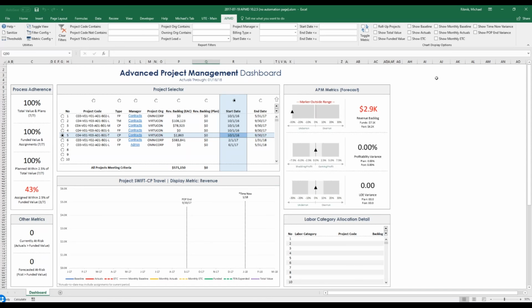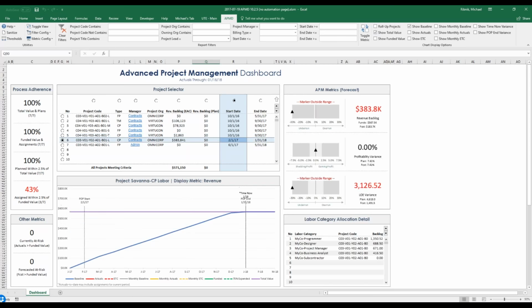So when you're awarded a project, you'll have a project total value or ceiling, and that's depicted in a purple bar going from left to right. Our recommendation as part of the project management process is to create a plan, a combination of people plans and expense plans in the system that add up to the total value of the project. And that's called our baseline metric below. And so you can see, let's see if we can pick one that shows it over time. Here's a good one that shows our baseline over time.